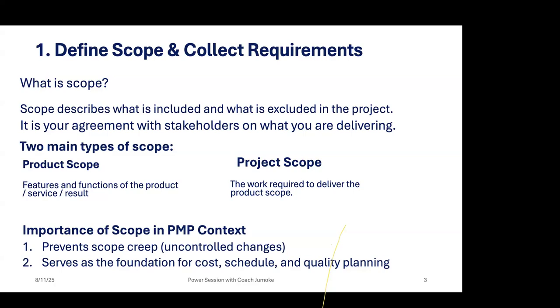And that is one of the things that WBS helps us achieve, because the lowest part of WBS are the work packages. And it is these work packages that you are going to break down further into their corresponding activities and then put estimation on them. And then when you aggregate all the estimation, then you will have a budget for the project.